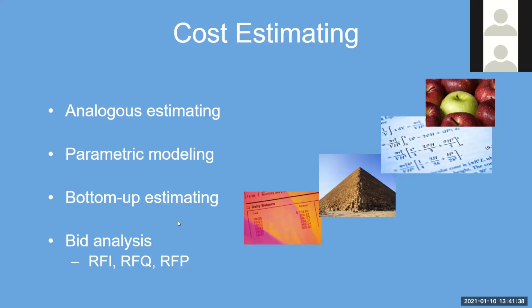So you did a project that involved sending 10 email campaigns. This project involves 3 email campaigns. So you say it's going to be about a third of the cost of project A, something like that. So basically, comparing what we have to do in this project to another project if we've done something like this before. And parametric is what again?